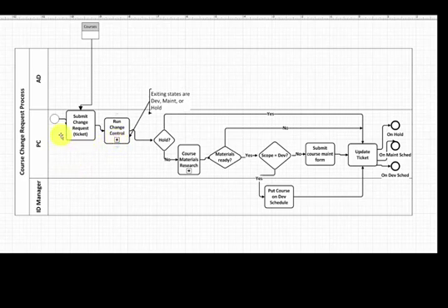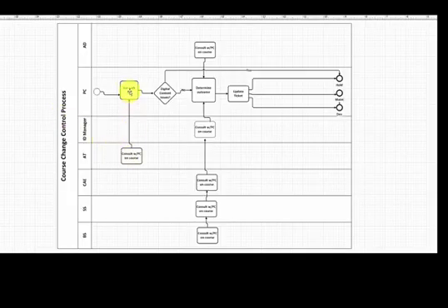The next step for this change request is to be run through a change control process that will first make sure that any technology needs presented by the course won't stand in the way of the ID team successfully developing and delivering the changes required. If AT does not feel that CCC Online can support the technology required by the desired course changes, the requested changes will be put on hold.